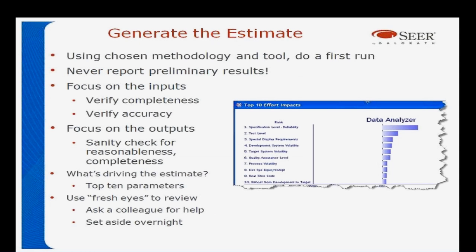Generate the estimate, of course. Focus on the inputs. Make sure you've got the best you can on the inputs. Focus on the outputs. Do a sanity check. For example, in SEER, you can plot and see how your estimate compares to others.